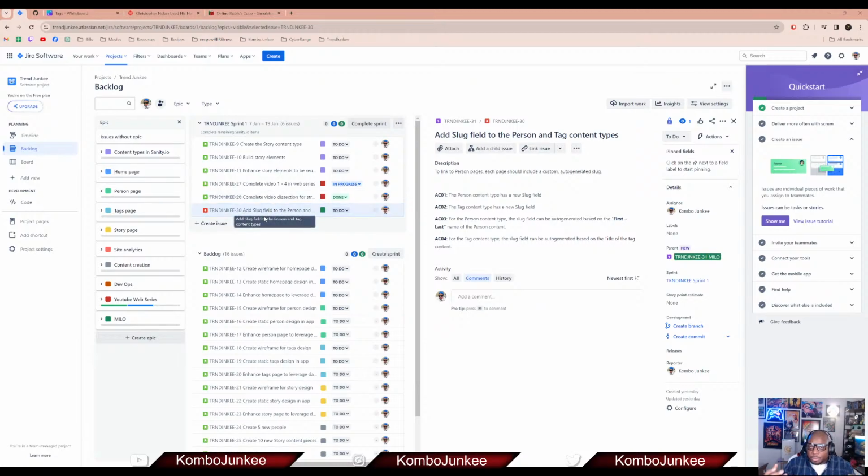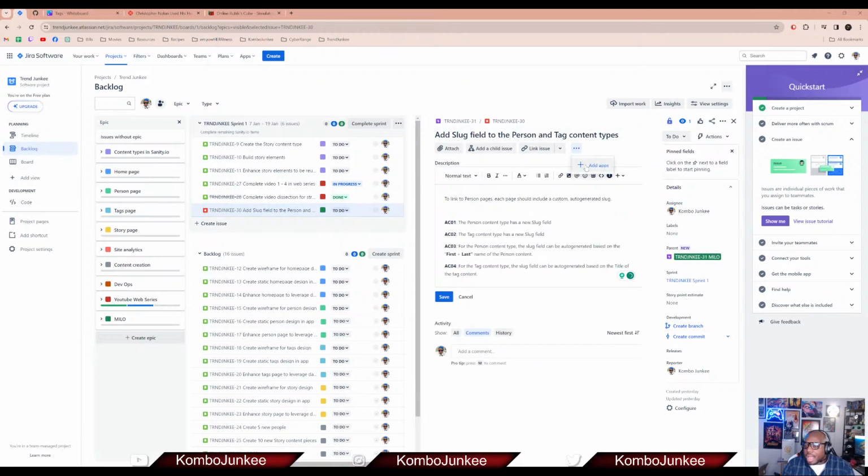At the end of this sprint, if I don't complete every single one of these tasks, then I'll be able to use my sprint review and retrospective ceremonies to say, well, we kind of overshot here. Maybe going forward, we should do less points, less tickets, etc. I don't think I pointed any of these either. We probably will need to do that at some point, where we say that the level of effort for each one of these is XYZ. That way we can more easily predict how much work I can do in a single sprint, right? So that's kind of where we are.